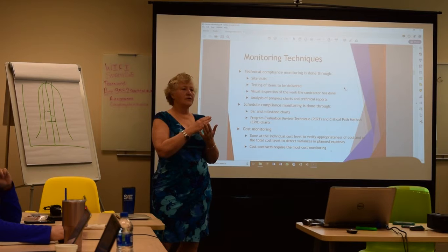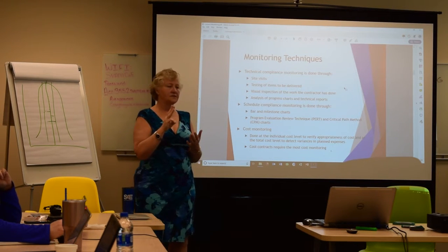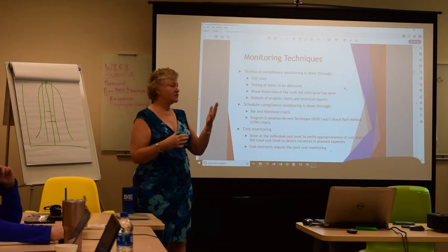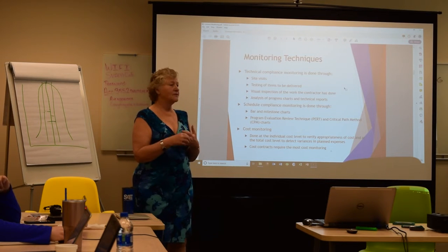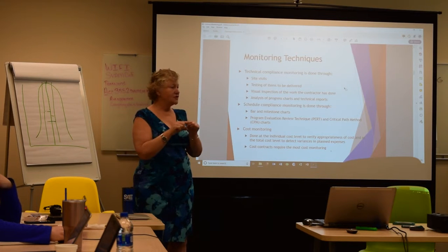So if we're, how many, 3 months in, how much is that into a full schedule? Quarter. So how much of the work should have been done by that point? Quarter, right. And how much should we have charged by this point? 25%. Good. And time-wise, we're at the 25% mark, right? So all those three things should be in sync.